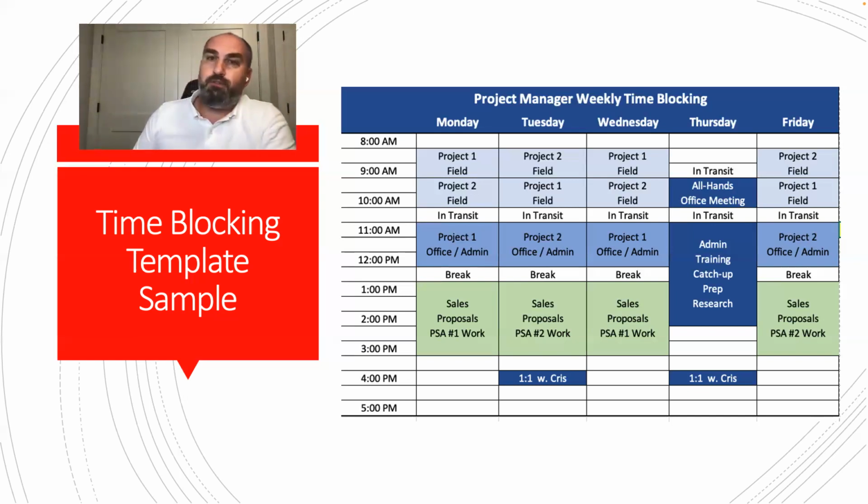We want to have eyes on site for at least 2 times a week, right? Maybe every other day. Meet subs, check with customers. Customers like to see us there, make sure that we check on the progress. We compare work being performed with initial scope of work and the details on the design plan. And even though we trust our subs, a lot of subs we've been working with for 3, 5, 10, 15 years, things still fall through the cracks. So it's good to have that on-site presence a couple of times a week.